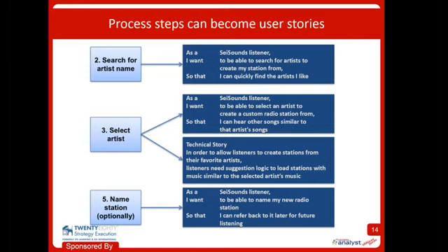Here are some guidelines too that we found kind of work. Each L1 step, each step in the process flow, is probably at least one epic in your top level process flow, but at that L2 level, which is what I just showed you, you might start to see about a 1-to-1 ratio of step to story. And again, it's about 1-to-1. You may have 2, you may have 4, you may have 0. All of those are okay options. I'm just trying to get you into the right ballpark.